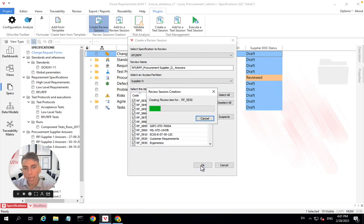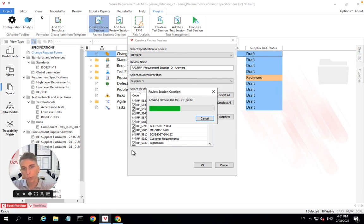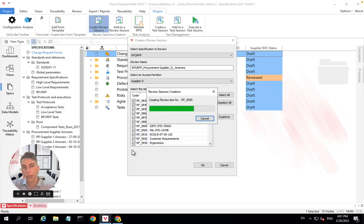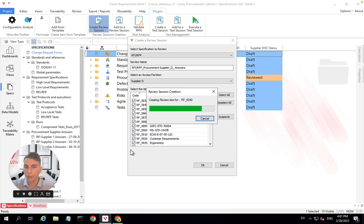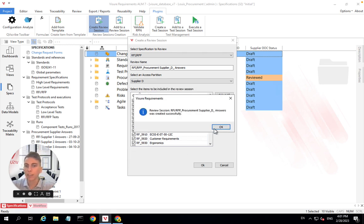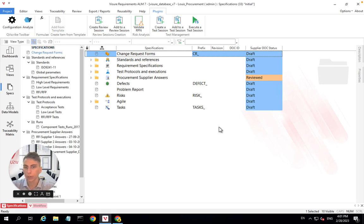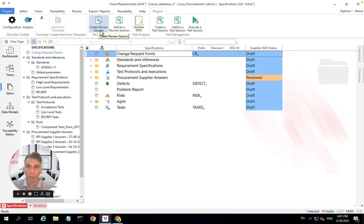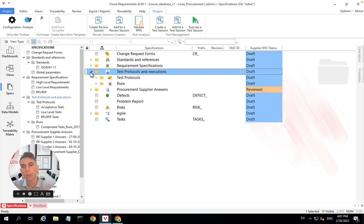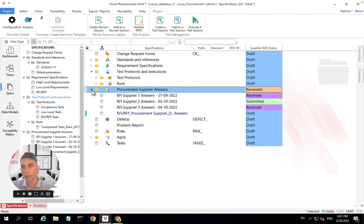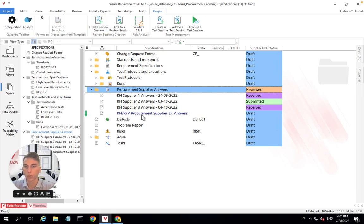When I click on OK, I'm basically creating copies of all our original requirements and creating a brand new document that supplier D will have access to and will be able to fill his answers in. So it's super important that I'm not giving our suppliers directly the original requirements, but only copies. And this plugin is more than a simple copy and paste because it also creates traceability links between the original elements and the copied elements so that we maintain traceability and we're able to track the answers from the original requirements.